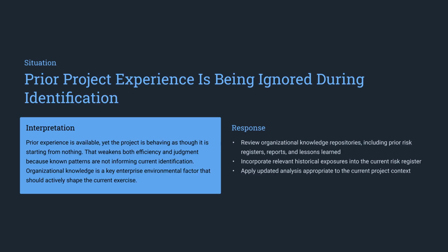Ignoring prior project experience during identification is another critical error. We should review historical data, such as previous risk registers and lessons learned, to inform our current analysis effectively.